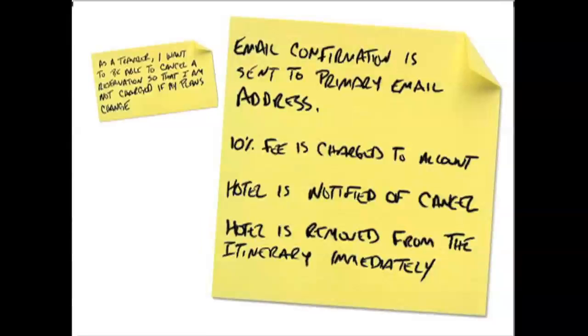So now what we have is an encapsulated business value in the card. In the conversation, we've elaborated, and so we've created a shared understanding. And now here in the acceptance criteria, we've created a series of up-or-down testable scenarios so we know when we're actually finished and we know when we're actually done. Jeff, is there anything you wanted to add to this?